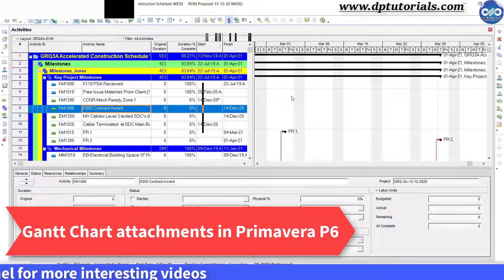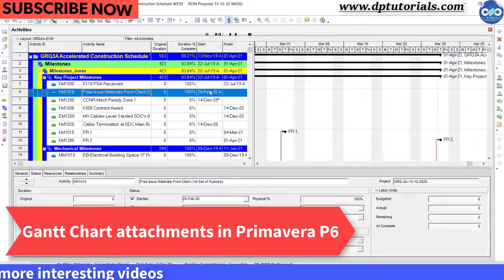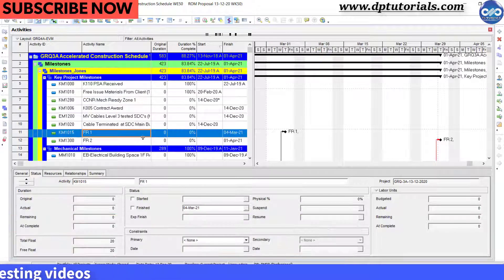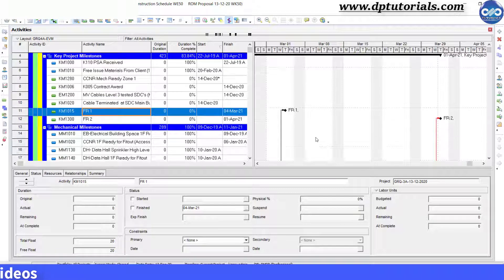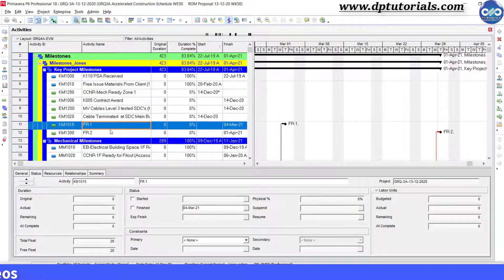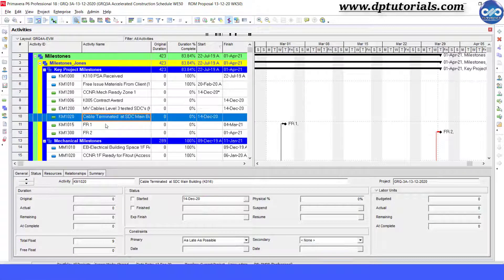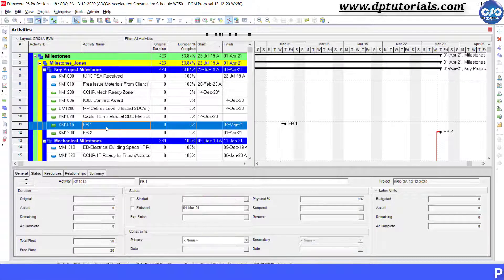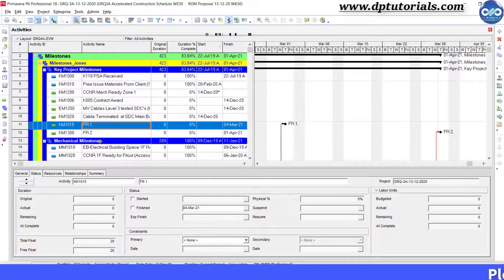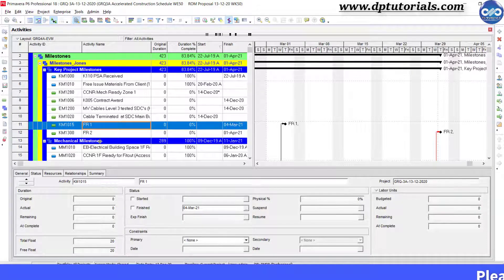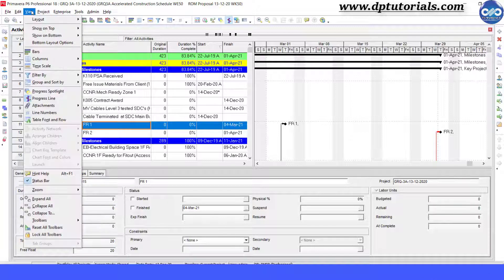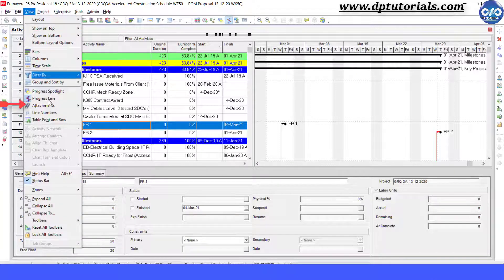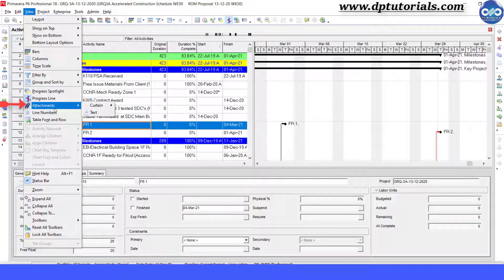This is my sample schedule. Suppose we want to add more details to the activity FR1 on the Gantt chart. First we need to select the activity FR1 in the table view and go to View in the menu bar, go to Attachments, and click on Text.